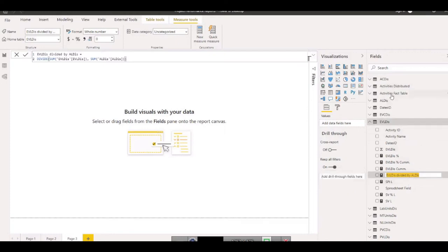For example, I will give you an example of why I am choosing to divide with the cost. You know why we are choosing to divide with the sum of the labor, not only the simple maximum or minimum. Why we need sum? Because we know that this table is not connected with the time period. So once we change our time period, the denominator should not change, because the project budget should remain the same. These things will be better understandable once we have developed the reports, and we will be analyzing them to verify and validate our data. At that point I will connect the same topic, how to get familiar with the data, which data is changed due to time changing, which data is changed if you change the filter. So inshallah we will be discussing them in upcoming sessions.